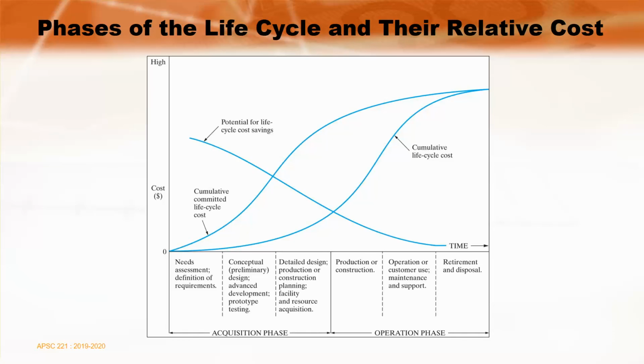And that's part of the reason why, of course, the potential for cost savings in the life cycle decreases fairly quickly over time, because certainly for the large projects, I'm committing to making cost expenditures early on, before I actually pay for the labor or pay for the materials. I've made a commitment that I will, in order to make sure that my project management lines up, that those materials are available to me, that the individuals will show up at the job site, and that they will be available for me when I need them.